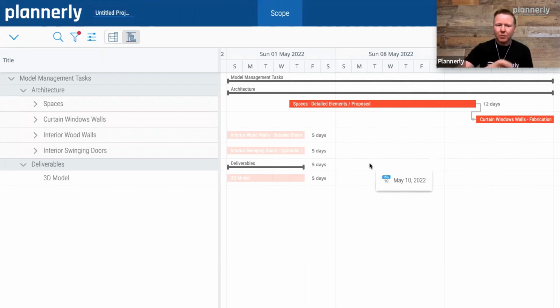So as you think about how you're creating these scopes, it's a management task list, it's a modeling task list. It's by team, it's by milestone, it's by stage, it's by phase, it's by understanding, and there's a lot of interdependencies and a lot of handoffs that are important to be managed. And hence why Louis mentioned me to say, hey, I need to have something before I can do this and deliver it. And that becomes a dependency between those that drives the timeline.